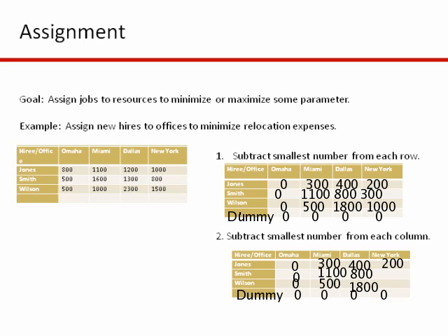So again, we're going to just subtract 0 from each of those, and essentially that column stays the same. Okay, so the first 2 steps are just subtracting the smallest number from each row and each column. Okay, so any questions on that?